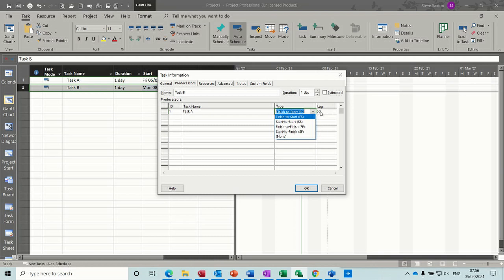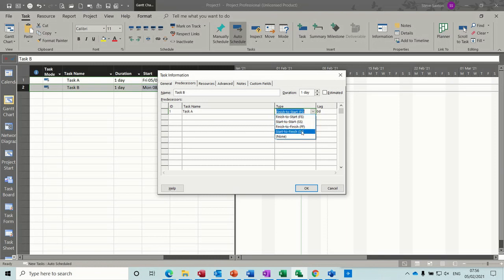but if you're going to put a lag on, or a lead on, so a lag is a positive number, which is basically a delay, and a lead is a negative number, you do have to qualify with these, FS, SS, FF, SF, whichever one you're using.